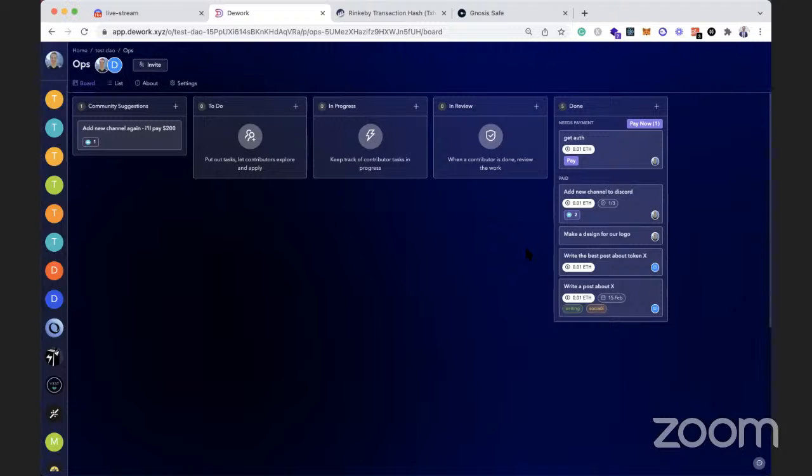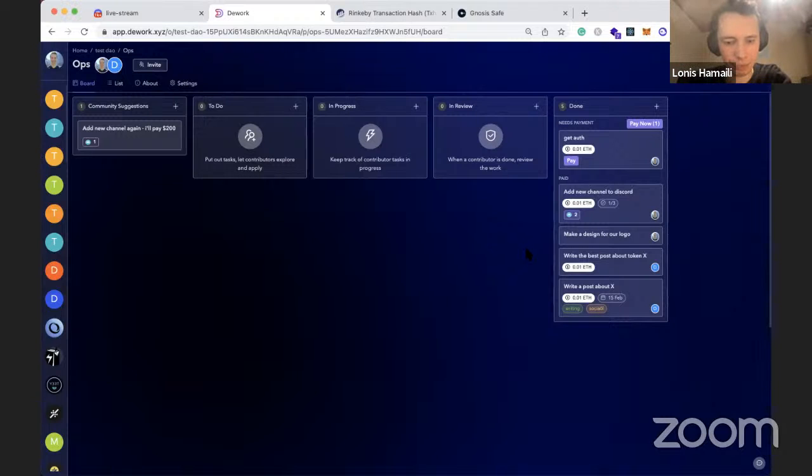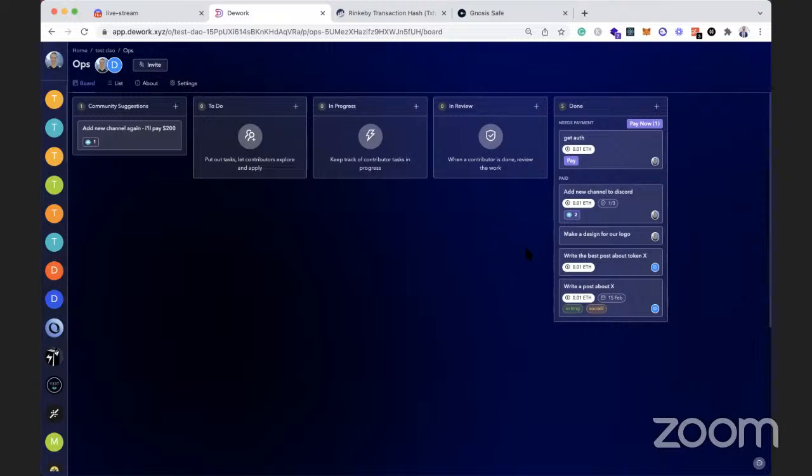I would want to duplicate that, so we have the history: this one was written for this week, the next one is written for next week. So we're able to take that write a post about X and duplicate it to create a new one for the next week or the next month. So if we have one monthly article, then after a year we have 12 payments, 12 things marked in the paid box for 12 articles. That's the level of visibility and openness we need. You can't keep having something recurring that then just gets used 12 times.